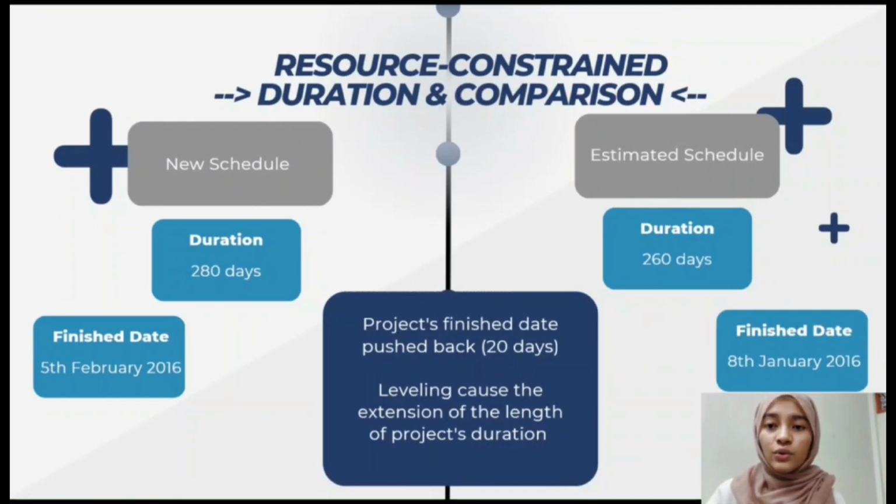This shows the impact of resources on the schedule, as the project does not have enough resources to complete each activity and be done on schedule. Hence, we have to do the leveling with the available resources, which will extend the length of the project's duration. And that's all from me.